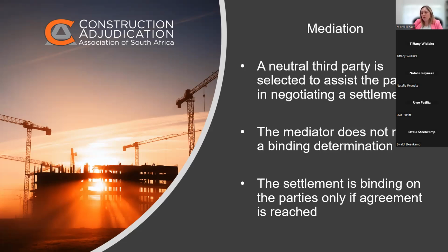What is important to remember, both with negotiation and mediation, is that at any time, no matter what your contract says, the parties can pull back and say, hang on, we don't want to waste money. Let's negotiate. Let's agree. This is the process we're going to follow to try and negotiate and agree. And when they reach, or if they reach that settlement, that is binding. And they can do that at any time, regardless of the ADR procedure stipulated in the contract.